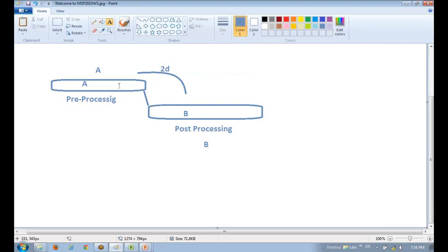So what will happen? If the pre-processing is complete, so the dependency is met, but because the transportation is not in the hands of the project team, we don't define this transportation in our project plan. But B is defined, and between A and B there is a 2 days of lag. There are 2 days of idle wait time.